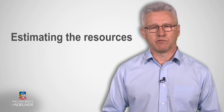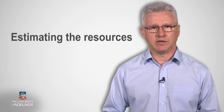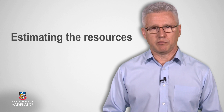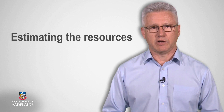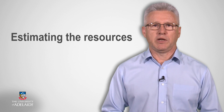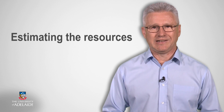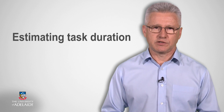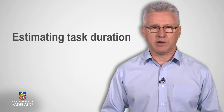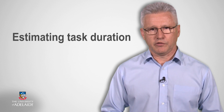You can then move on to the next step, which is estimating the resources required for undertaking each activity. These resources might include materials, people, and equipment to perform a particular activity. Estimating activity resources is closely linked to assessing and estimating the duration of each activity. Estimating task duration requires you to consider the amount of work needed to complete individual activities using the estimated resources. As you might have noticed, resources and time coexist with one another.